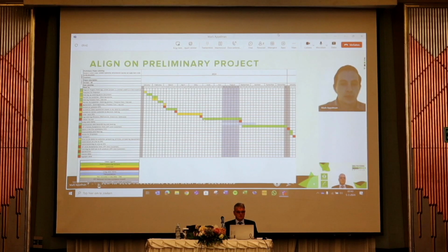And when we're done with engineering, we need to start production, which also takes some time. Maybe some long lead items, if there are any in the project. Basically, this follows all the steps that we do as SeedProcessing until we reach a certain date. Most of the time we call it the ready for shipment date. It's the day that the products are ready to be transported to your facility. So this gives basically a good overview on how long the whole project will take, not only production but also preparing on the sales side.